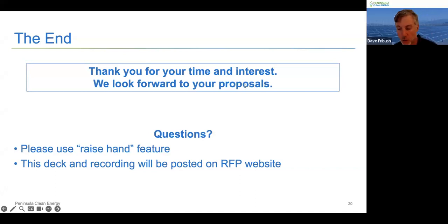Right, sure. The way that we had structured the first portfolio was we had provided them the form of agreement and indicative pricing. I apologize, we provided them a ballpark of where we thought pricing would come in. But we didn't say this was the pricing because we didn't actually have the bids, so we couldn't give them the final PPA. Once we got pricing, they'd already signed off on all the terms of the agreement, and so we then provided pricing. Everybody was happy with the pricing.